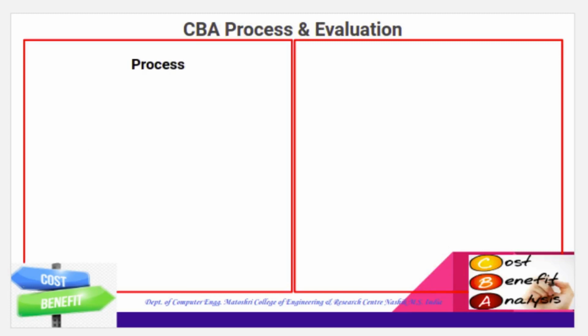The steps for a generic cost benefit analysis: an analyst or the project manager should apply a monetary measurement to all of the items on the cost benefit list, taking special care not to underestimate cost or overestimate the benefit.